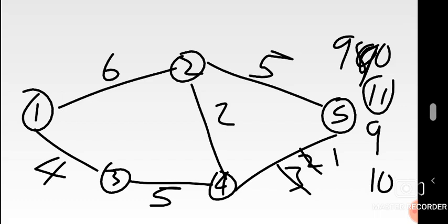What does this go to show you? The original one, right? We've already crashed it and it has reached what? Its limit, meaning the project cannot be reduced any further. We just stop there. Of course, critical paths are emerging, but the moment it ends up taking you back to your original point, then you cannot crash any further. Whatever cost you've accumulated, that is your overall cost. You just determine that, okay, my overall cost will now be 990, because apparently we will not crash any further. From what we can see, it has taken us back to the original point, and the original route has already been crashed. And if it took us to another route which has not been crashed, then we would have proceeded.